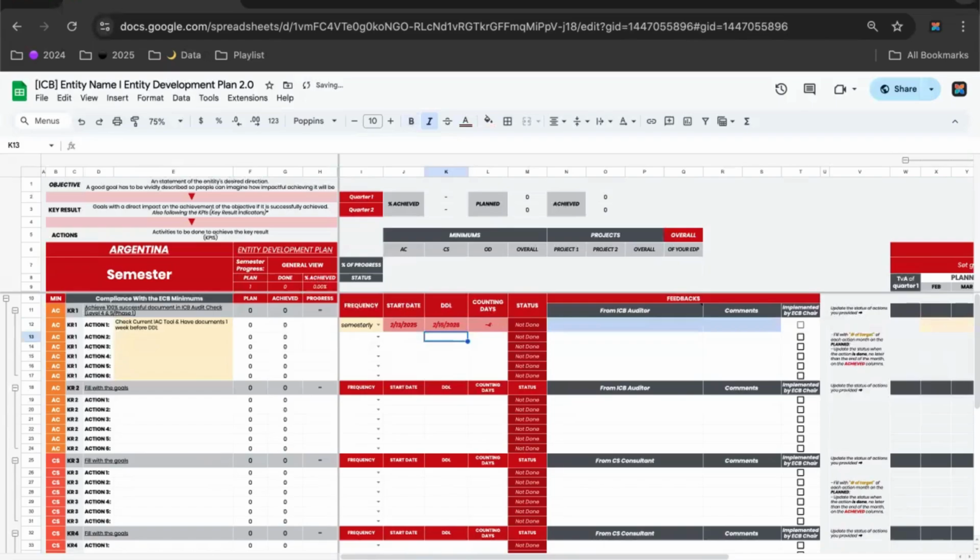So as you can see here, if you put in a starting date and a deadline, and the number of days left turns out to be negative, it means this is a reminder. This action step is not even done yet, even though it has already passed 4 days from the deadline you set. Okay, so what you need to do is ensure all things are still on track.